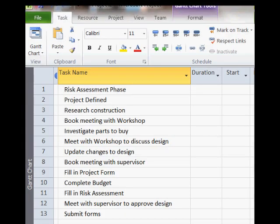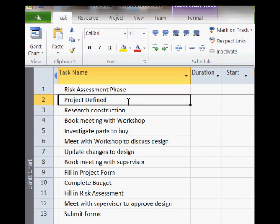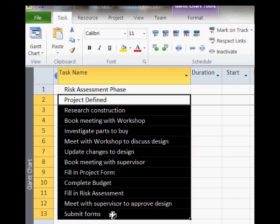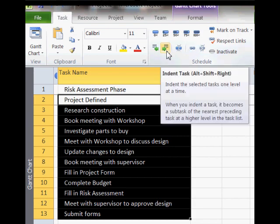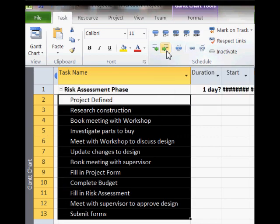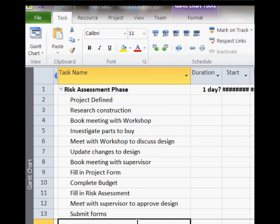As risk assessment phase is the identifying name of the phase, we will make all the activities underneath it a sub-branch of it. To do this, we select all tasks and then click on the indent button. All tasks associated with this phase can be hidden or shown at the click of a button.